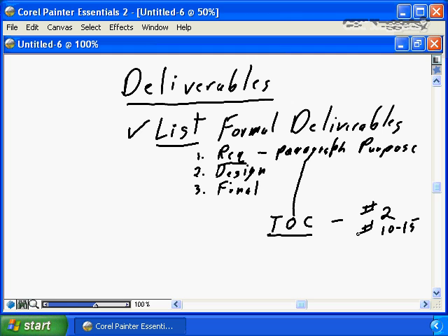The final step would be to, again, provide a paragraph that says, in the executive summary, we will do, and it will be 2 pages long. In the current situation assessment, we will do, and it will be 10 to 15 pages long. So again, you need to define the deliverables. The deliverables define what the final product the business will be accepting. The list of the deliverables will allow the business to understand what is being delivered and whether that will allow them to achieve their objectives.